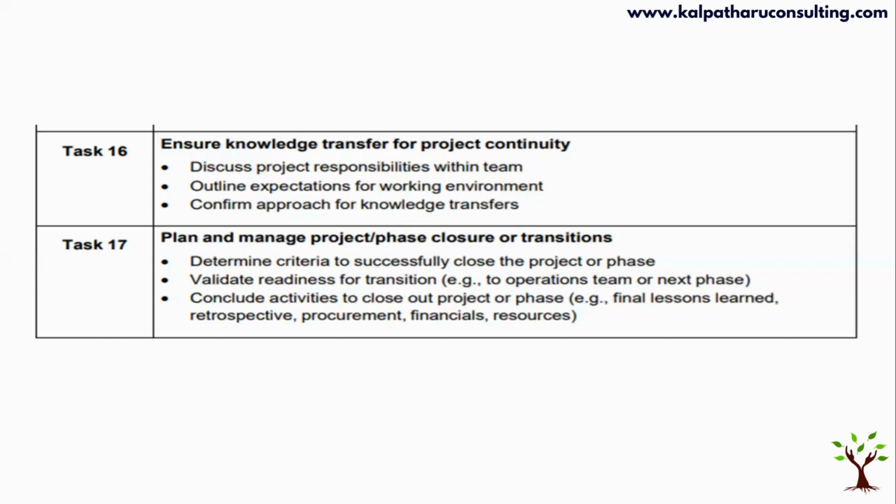So you can create a final report, and analyze all your documents which have been developed throughout the project, and ensure that whatever the project objectives defined at the start are being met. Create a final report to be submitted to the management. Retrospective: understand or analyze what went well, what did not go well, and those learnings can be captured and shared with the organization as well.